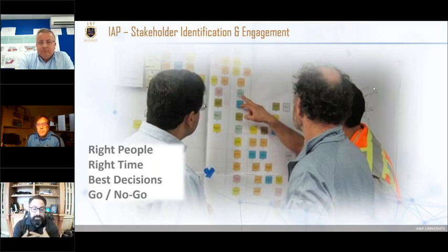Path of construction in AWP is a pivotal point for identifying the overall basis of how a project is going to be executed and what the bits and pieces are going to be in what basic order. We then, of course, break that down into what we call the CWPs, which are part of the POC, but then into IWPs, into those packages.